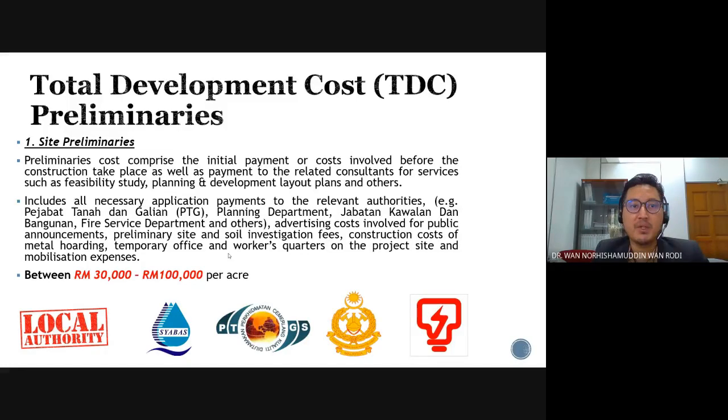The first one would be the site preliminaries. Site preliminaries comprise the initial payments or costs involved prior to the construction, which need to be paid to the consultant for services such as feasibility study, planning and development, layout plan, and others. Some of it we need to pay to the local authorities, and then we have to pay some contribution to Syabas, and Pejabat Tanah. You have to pay some money to the Bomba, fire service department, TNB, etc.